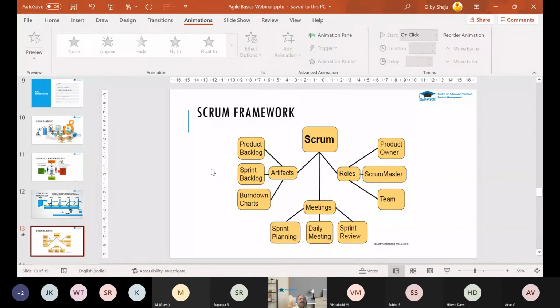So in the sprint planning, you will be deciding. If in sprint one you accepted 20 story points, and that was the main constraint that you identified, then in the next sprint you will be deciding on 15 story points or something. Okay. So obviously there is a possibility that we can add more resources to that sprint to cover the extra amount of work.